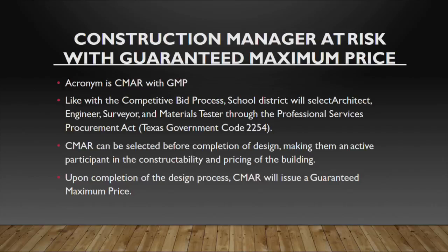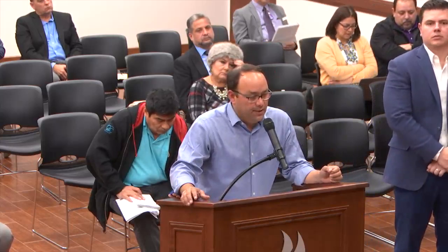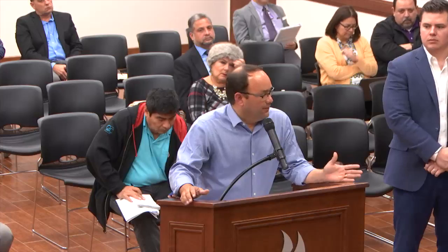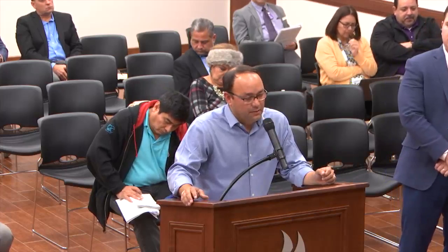Yeah, so at the end of the day, when you get 3 teams, it's a 3-prong approach. As you're working through design and developing construction documents, you're able to do constructability reports, and as you're going through the process, you're able to at least get some pricing based on local bids. There's a lot of transparency, because for every division, every section, they're receiving bids and awarding them based on qualifications and price.